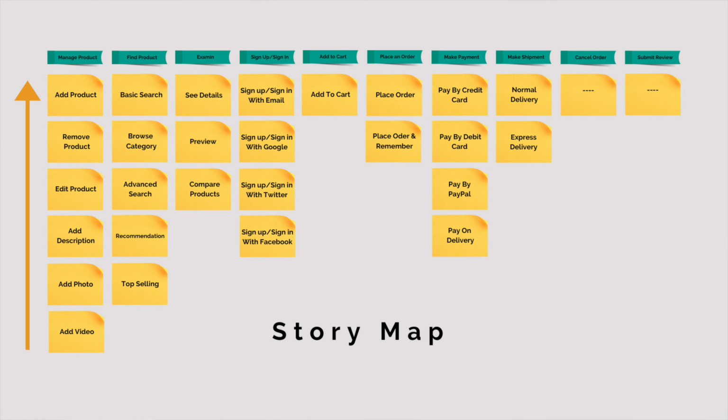Of course, this is oversimplified for the sake of education. Or is it? The second prerequisite for estimating user stories is having a baseline or a bunch of reference stories that the team can use as a benchmark for new estimates. So let's see how we as Scrum Masters and Agile coaches can help our teams create a bunch of reference stories. We'll be using this story map that we created in the last video, but if you don't have a story map, just use your prioritized product backlog.